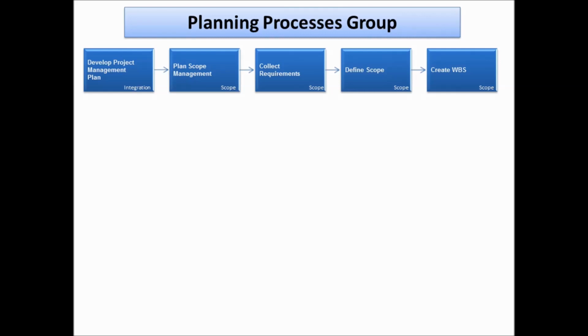So, moving on, let me remind you of one key concept here. The scope baseline is the combination of scope statement plus WBS plus WBS dictionary. Remember this key concept here. Now, what is a WBS dictionary? It's basically a document that describes each component of the WBS with milestones, deliverables, activity, scope, sometimes resources, costs, quality. All these will be mentioned in the WBS dictionary.